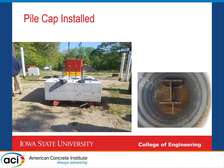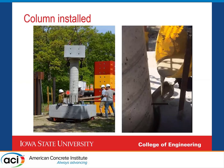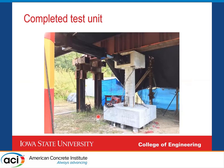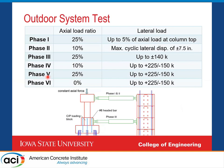After the piles were driven, we cut the piles and used temporary collars — that's how we were able to achieve the 24-hour timeframe. The temporary collars supported the pile cap and column soffit. The battered piles would not be centered in the corrugated pipe, but the design accommodated this. We used a grouted connection between the column and the cap, and self-consolidating concrete between the pile and the pile cap. The piles were exposed so we could attach instrumentation and collect data.